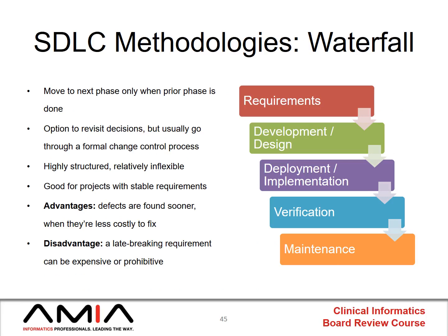So that was the example of the basic SDLC principles. There are specific SDLC methodologies, and they differ significantly. The granddaddy or the grandparent of all these is the waterfall methodology. And this is where you basically just do everything stepwise, and you're only allowed to go to the next step once you've completed the previous step.